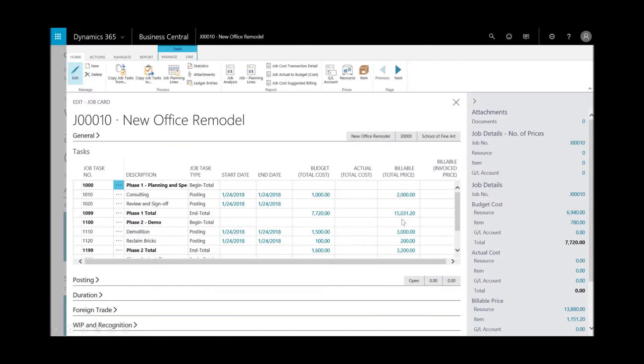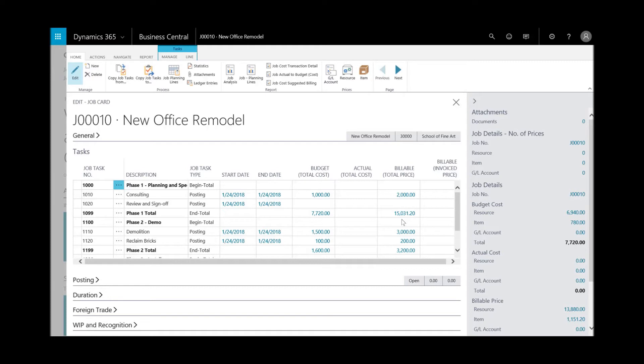I took an existing template and copied that over into my new project. When I start a new project, I've got to create the job card with integrated tasks and planning lines, and it's structured into two layers. The first layer consists of the tasks, and I have to have at least one task, as you see here. Behind the scenes are the planning lines, and that's where I go to post the consumption to the job and specify the resources, the items, and the various general ledger expenses.